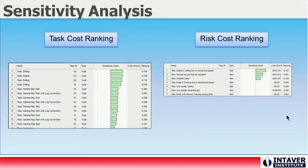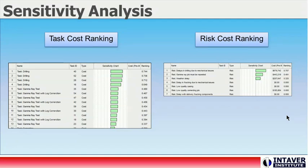Sensitivity analysis, or tornado charts, provide insight into which tasks or risks have the most potential to drive costs in the project. On the left, we have a list of tasks ranked by how much their risks and uncertainties impact the cost of a project. On the right, we have a similar ranking of risks. It is extremely likely that the highest ranked risks are assigned to the highest ranked activities. To minimize potential cost overruns, we need to focus our risk management efforts on these tasks and risks.